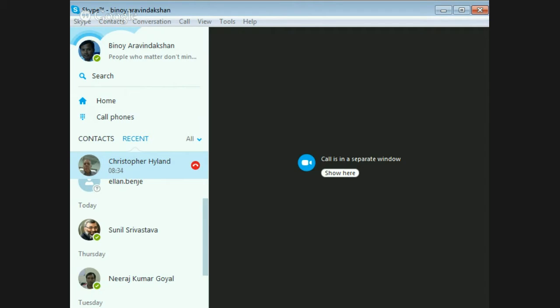So we have instructed items, which the contractor has been told, okay, you need to do this work. We've got a pretty good idea of the cost, and we put those in so that we can keep track of what the overall project is going to be, whether it's going to be within the overall budget. Because as soon as it gets outside the budget on a government job, you have to go back to government and get more money. And that's one of the biggest difficulties working with government clients, is when you get that final top of the budget, there's no more money to pay unless they get approval from whoever's funding them, either the government or one of their multilateral or bilateral funding agencies.